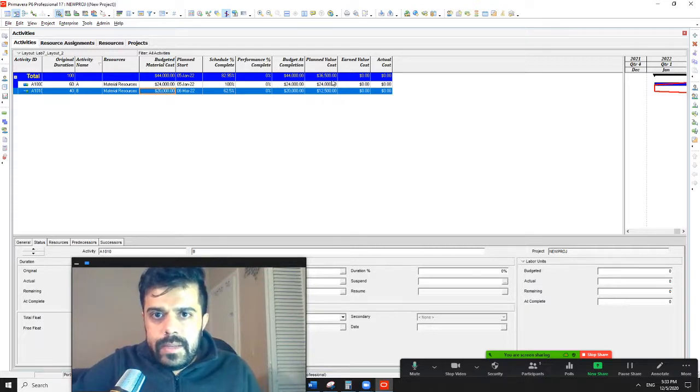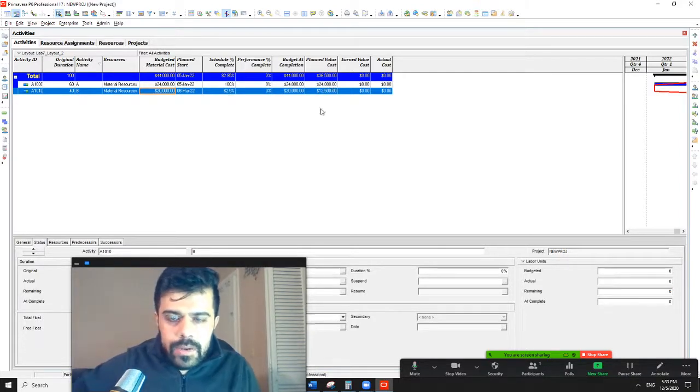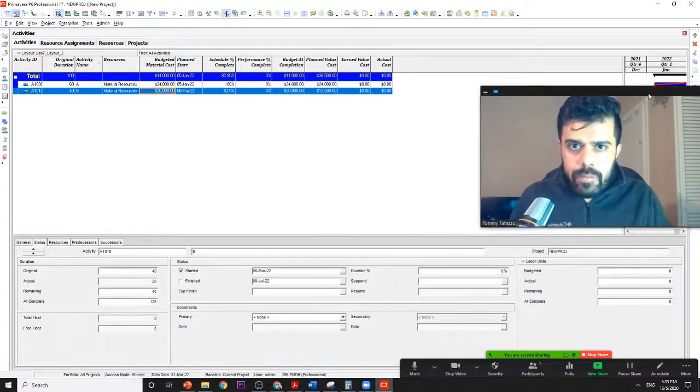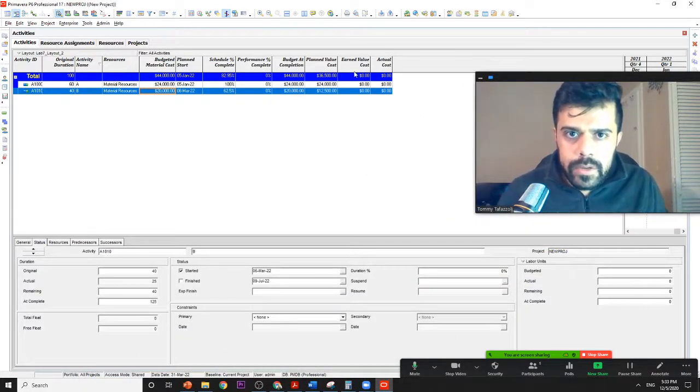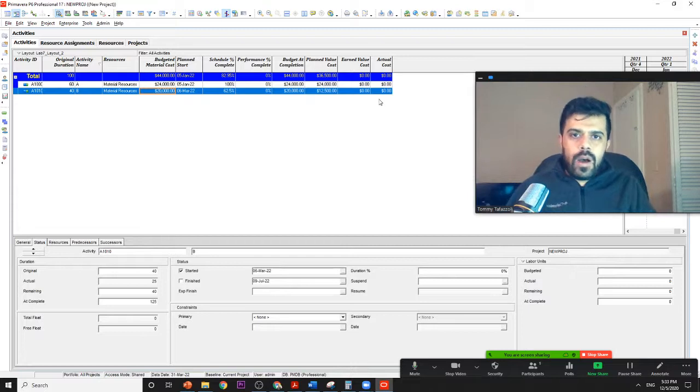As you can see, the planned value is now available because you have the schedule percent complete. So the planned value is also given. So what is remaining? The remaining items are now the earned value and the actual cost.